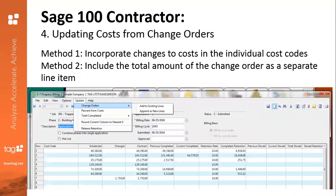Now, let's talk about updating costs from change orders. You have two methods. You can go up to that menu bar, hit Update, and go down to the first option, Change Orders. Two options will come up: either Add to Existing Lines or Append as New Lines. The first method will incorporate changes to costs in the individual cost codes, and the second method will include the total amount of the change order as a separate line item. Choose one and then you will be able to update.